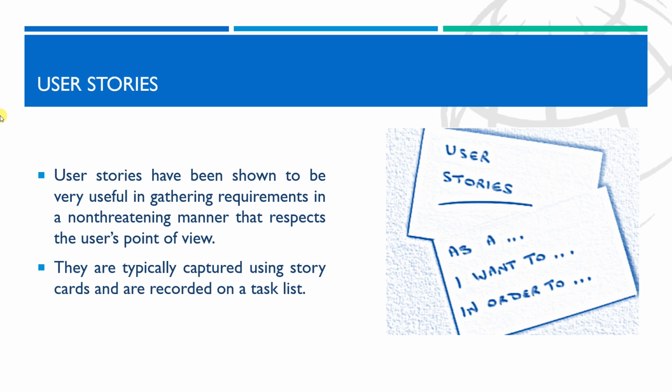During the discussion, a task list is created for the story. If the story is deemed to be too large, the story is split up into multiple stories, each being recorded on its own story card, and the tasks are allocated across the new stories. In many shops, once a set of tasks has been identified, the story and its tasks are taped on a wall together so that all members of the development team can see the requirements.